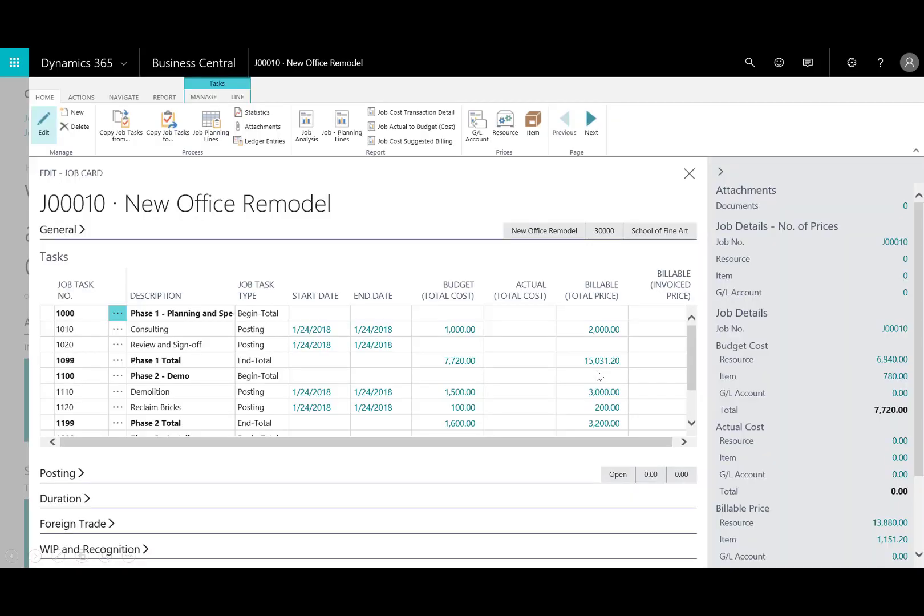So, I took an existing template. When you start a new project, I could take an existing template and then copy that over into my new project. So, when I start a new project, I've got to create the job card with integrated tasks and planning lines, and then structured into two layers. The first layer consists of the tasks, and I have to have at least one task, as you see here. And then the behind the scenes are the planning lines, and that's where I go to post the consumption to the job. And that's where I specify the resources, the items, and the various general ledger expenses.